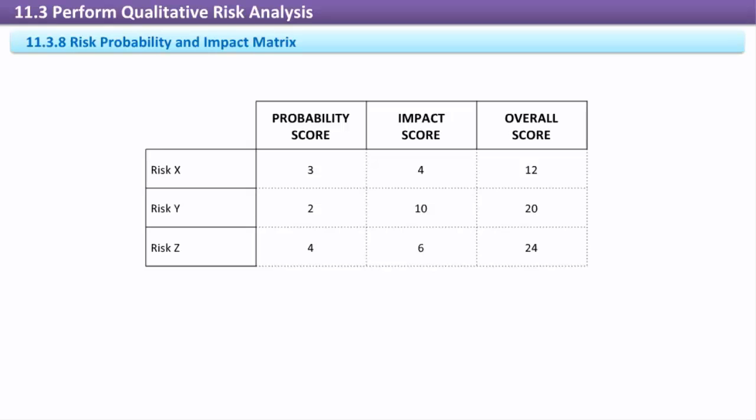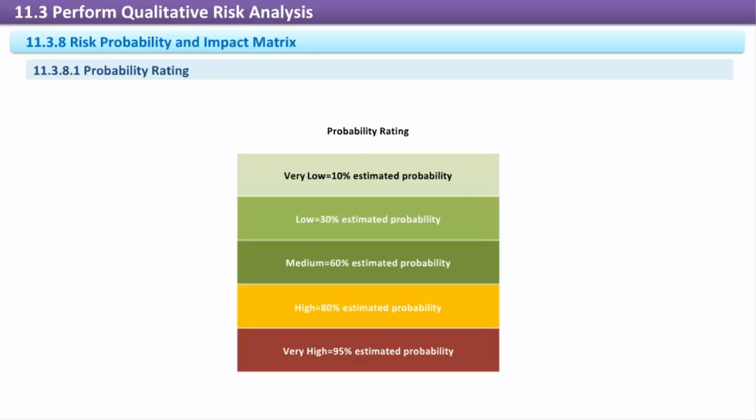In order for assessments to be uniformly converted to ratings, there must be unambiguous definitions. If the scale used is not consistent from risk to risk or person to person, then subsequent rankings, scores, and priorities will be flawed. The probability and impact matrix often includes a sample page where the rating system is explained with descriptive legends. Probability rating. A legend provides the mechanism for converting probability assessments into a rating that is normally a linear scale.